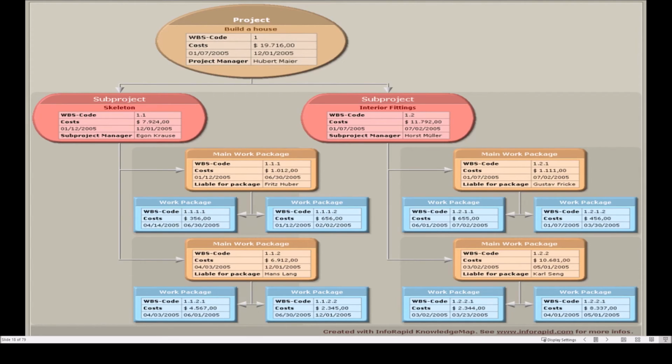So we've decomposed like the previous slide. We've unpacked the project from the top down, and as part of that, let's see this one here where my mouse cursor is, 1.1.1. Let's just describe this one as foundation. And then the blue one, which is subsequent, these are tasks that drive these, so broken down even further. This might be about digging out the foundation, and this might be about pouring the concrete.